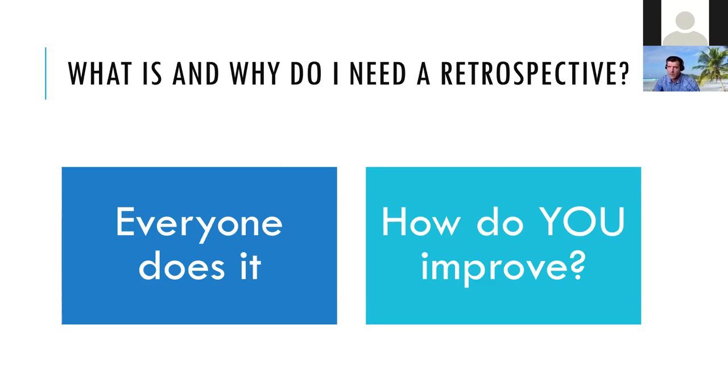And I would say the most important one, I wouldn't say that the previous ones were not, but if we had a nice talk and we didn't make any actions, and those actions weren't accountable, we didn't assign a person accountable for that action, nothing will change. And this is actually the retro killer.